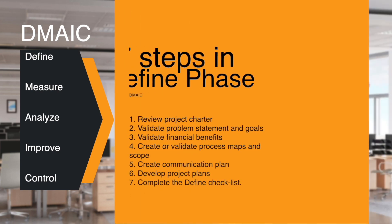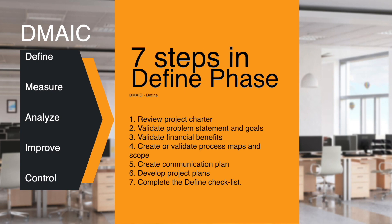First step: Review the project charter. In this step, review and discuss with your team the draft charter from sponsors. Ask questions and get answers. Negotiate compromises or adjustments to scope, resources, timing, and who should be on your team.